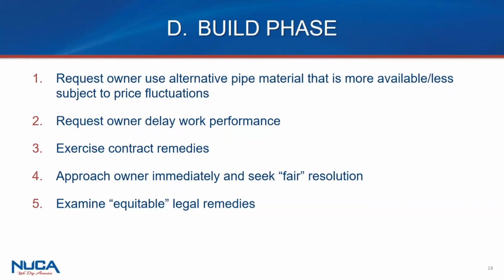Two or three, exercise contract remedies, which circles back to what Shawn says: so often when we're approached with an issue, one of the first questions that we ask is, what does the contract say? And too often, while the contractors are good at evaluating the technical specifications of the contract when bidding, as well as the plans, what they're not as focused on is the general conditions portion of the project. And it's just critical to be evaluating that in terms of what rights do I have relative to this issue.